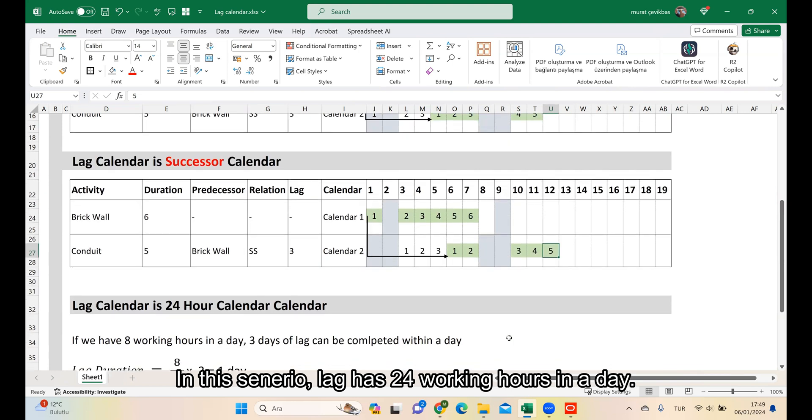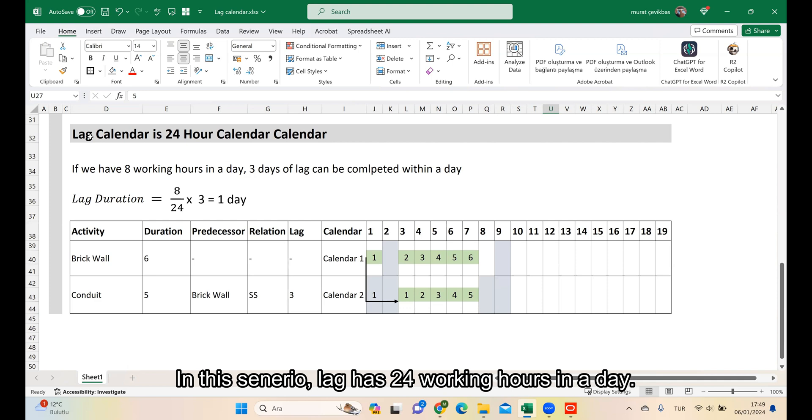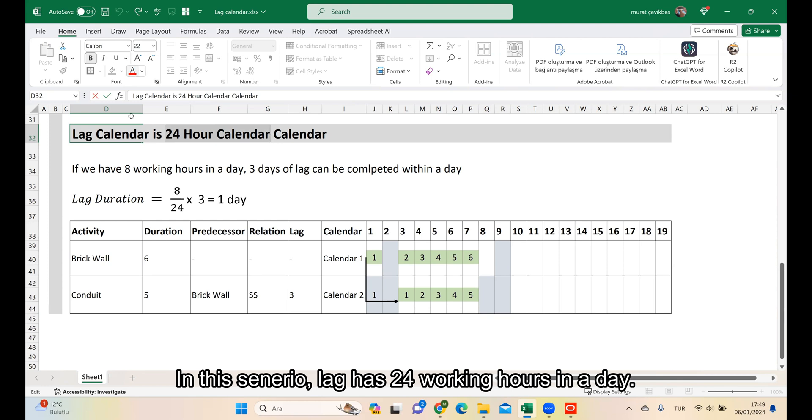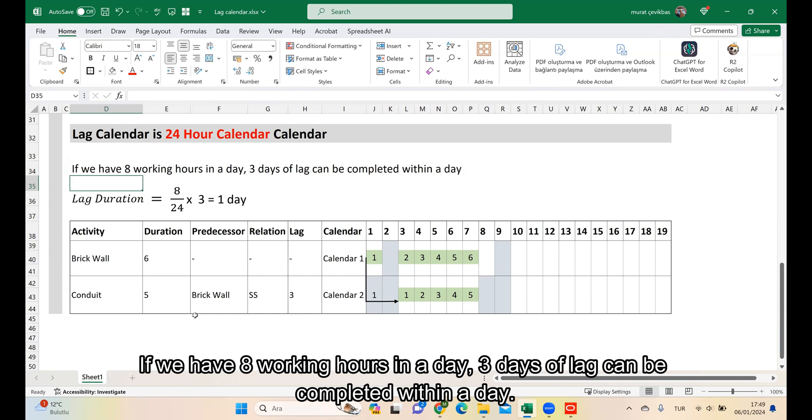In this scenario, the lag has 24 working hours in a day. I will mark it in red. If we have 8 working hours in a day, 3 days of lag can be completed within a day.